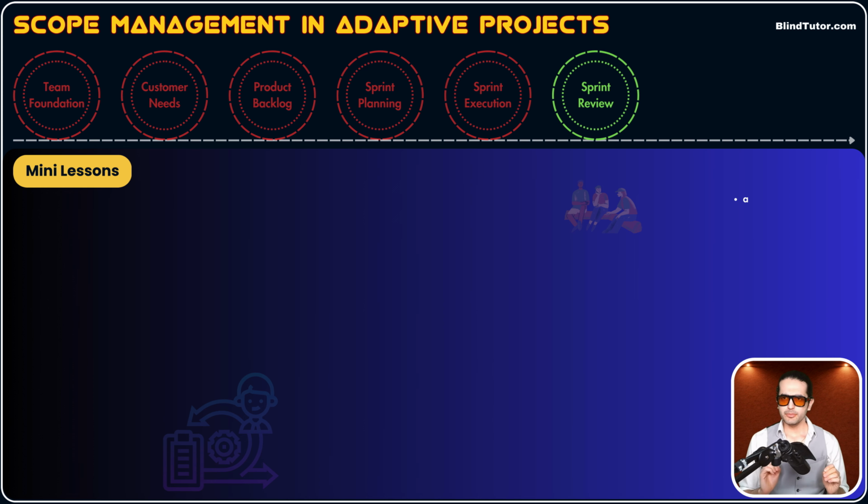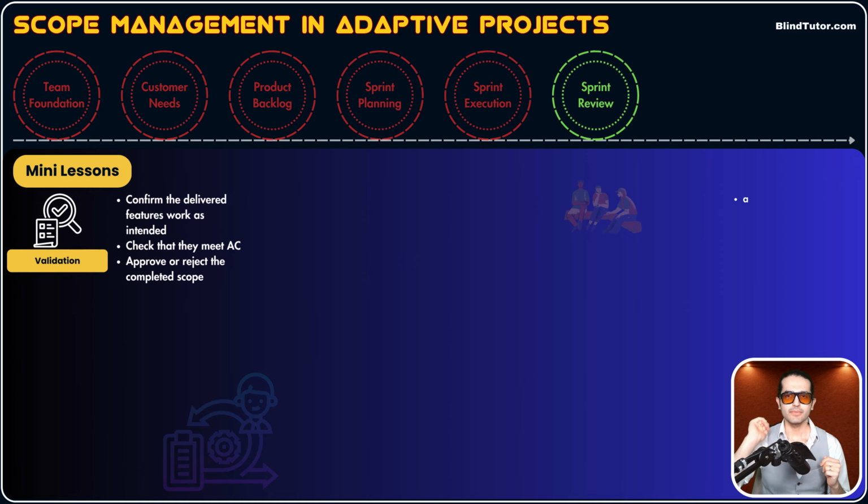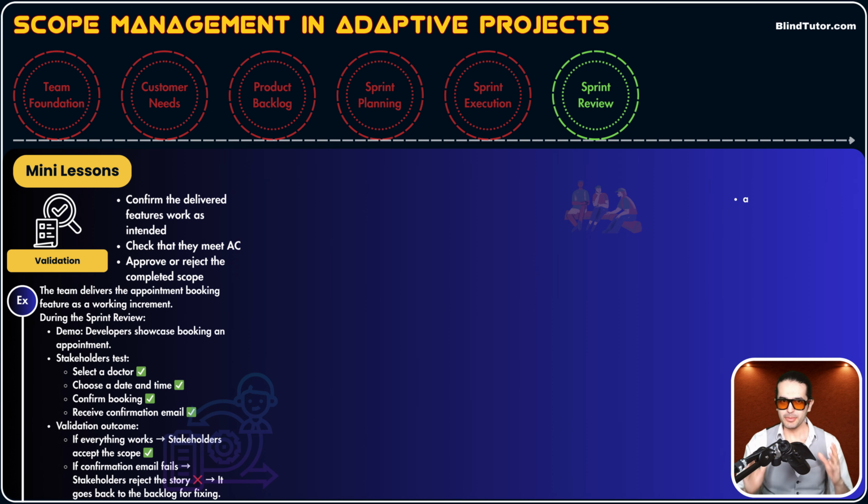All right, let's continue our mini lessons with validation. Guys, in the predictive part of the project, we had a process called validate scope. In that process, stakeholders tested and inspected the verified deliverables, and if they meet the acceptance criteria, the verified deliverables will be converted into accepted deliverables. Same thing goes here, okay?